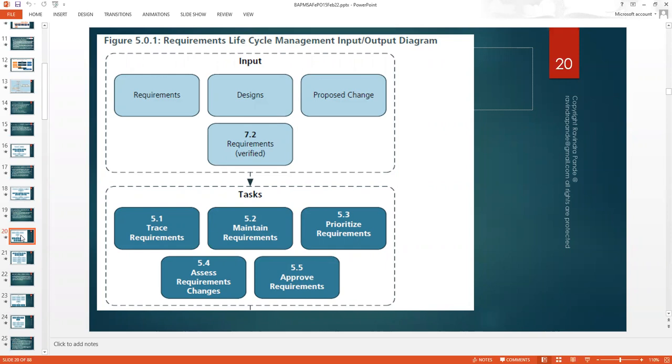Then you move to maintain requirements. How do you maintain requirements? You keep updating these lists step by step. Whenever we discuss something which is related to another requirement, that requirement also might need to get updated. And this way, we maintain the interdependency and maintain the requirements list. And then we prioritize the requirement. Rather than the business analyst, the business prioritizes this requirement. Now here business means the client, the State Farm of the world, the stakeholders of the world. They prioritize this requirement depending upon their wish list, depending upon their planning of improving their business step by step.